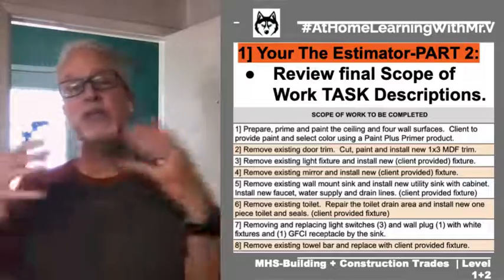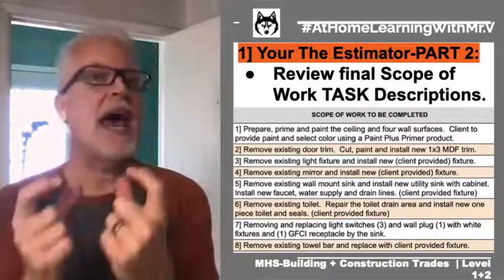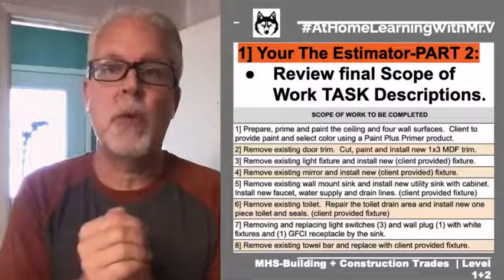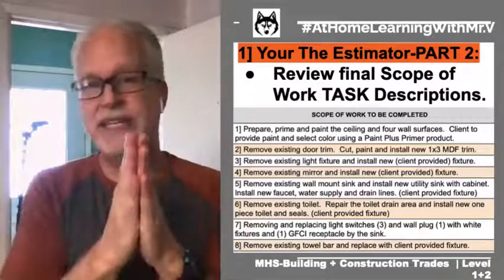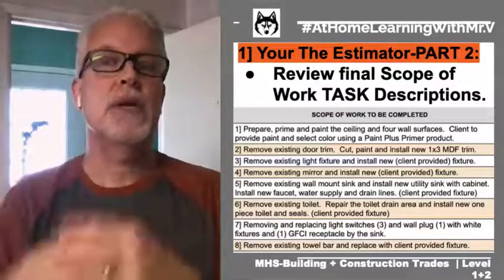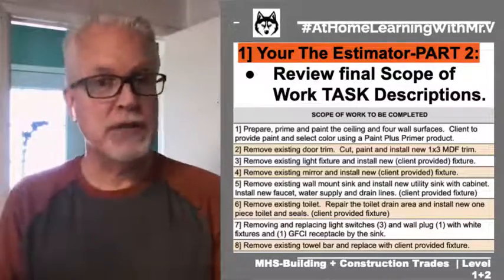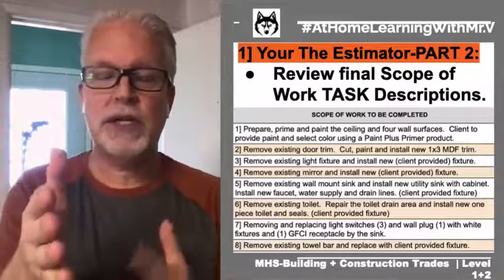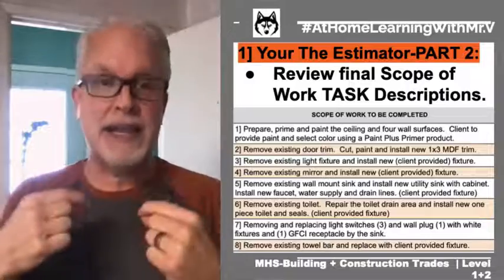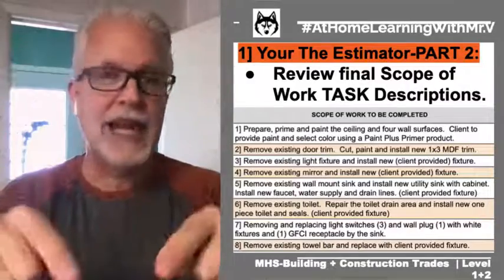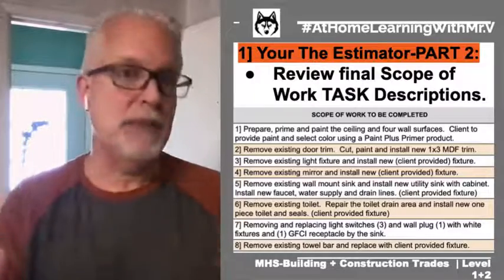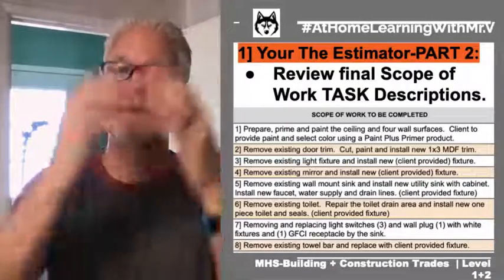Excellent. Okay, so here's a great example of a whole lot of detail that we didn't necessarily get when we were first doing the walkthrough, but as the client kept giving me information, I had to keep adding it into the scope of work description. Because if you remember, the scope of work description we're using becomes part of the legal contract. If I sign off on it as a contractor and the client signs off, this is what she or he is willing to pay me, and that is what I'm legally responsible for doing.